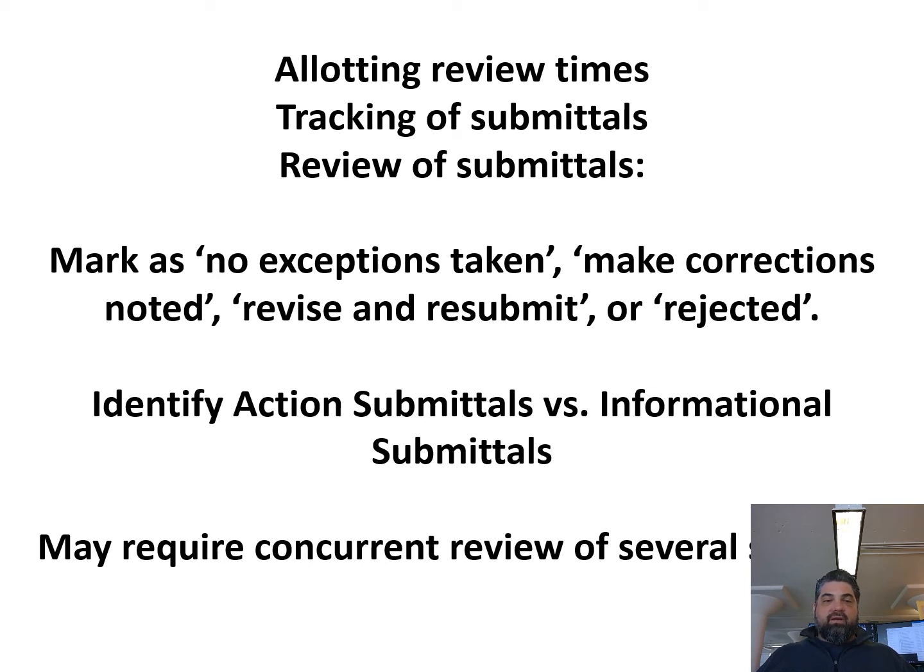So when you receive these, you will typically take one of these 4 actions on it. You will either do no exceptions taken, make corrections noted, revise and resubmit, or reject it. So no exceptions taken is a different way of saying it's approved. But rather than approved, you're saying I don't take any exception to it.